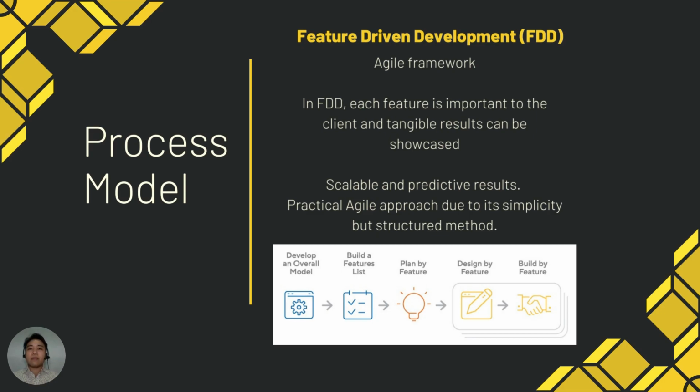So we had used the feature-driven development, which is a type of agile framework. So during the first two steps, the overall model shape is formed, and then the final three are repeated for each feature. So teams are organized by features rather than project milestones.